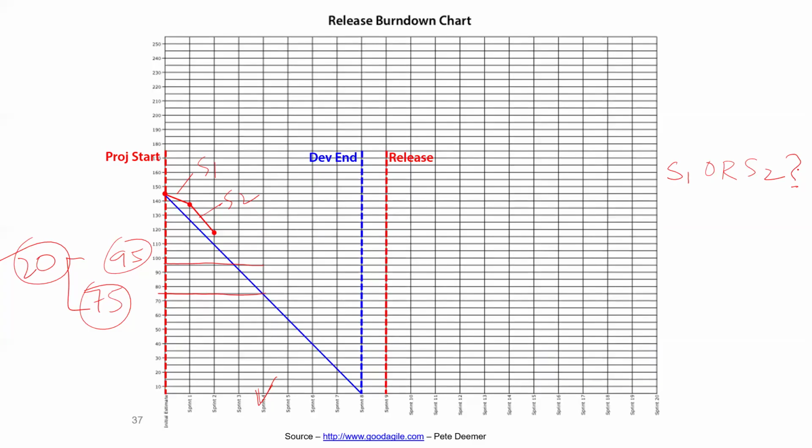See, very simple. Looking at the slope of the line, you can make out. If the line is more flat, that means remaining work hasn't dropped much, so less productivity. But a sharp decline would mean high productivity. A lot of remaining work has dropped significantly. If you compare the slope of sprint 1 and 2 here, it's clearly visible that in 2 the team was better. 1 went bad. 3 was also not that good, less productivity. 4 was relatively better. Anyway, we understood these 2 lines.